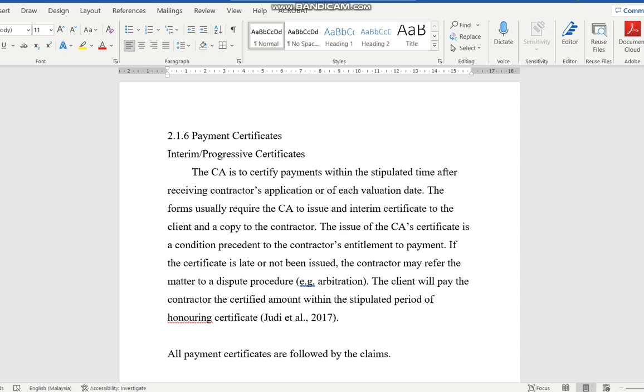Performance bond is because you're worried that the contractor halfway through the project doesn't perform, runs away. So you take 5% or 10% of the contract sum, you keep it until the end of the project, until they really perform, and then you release the money back to them. Of course, it can be in the form of real cash, meaning that in the interim payment, you take away 10% of every payment, up to 10% even, or 5% of the contract sum as performance bond. But that is a very serious breakdown in the cash flow of the contract.